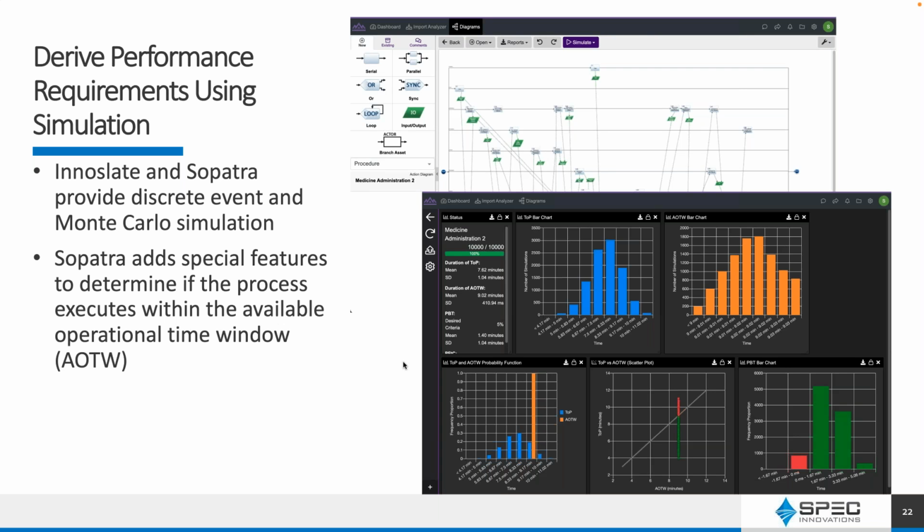Again, this is also kind of getting to risk and risk analysis as you're doing these Monte Carlos. Now, of course, the way we get these distributions is we're adding time distributions to each of the variables that are appropriate in the action diagram. That's where those come from. With Sopatra, there's actually a database available from research done by George Mason University. They have done a decade or so of research in this area, and they derived a set of very, very useful time distributions. So I think you'll find that's a very nice aid as you're trying to do this kind of work.